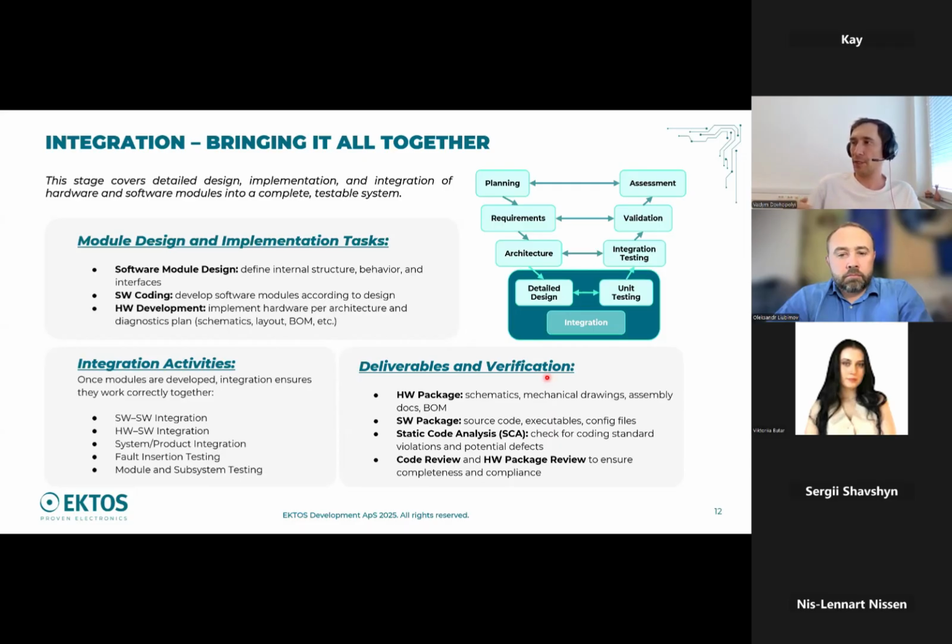The deliverables at this stage are the detailed design, and if we're talking about software, based on the detailed design we make unit test planning, and having the code, we execute these test cases, and we have unit test reports, and so on.